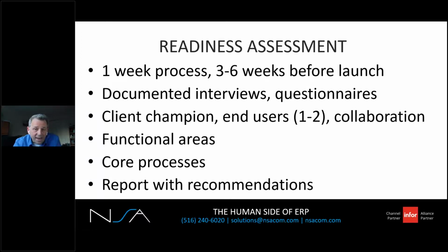The assigned external consultant schedules an interview for each functional area. So let's say there's one session set up for AR, one for AP, sales order processing, accounting, warehouse receiving, warehouse shipping. You get the idea. You've got 7, 8, 9, 10 different functional areas. Plan for 30 minutes per user, or per session would be 60 to 90 minutes.